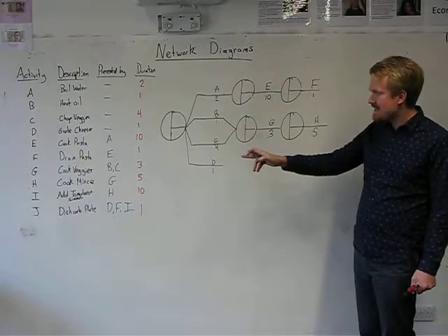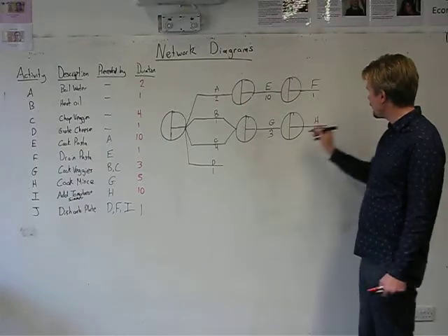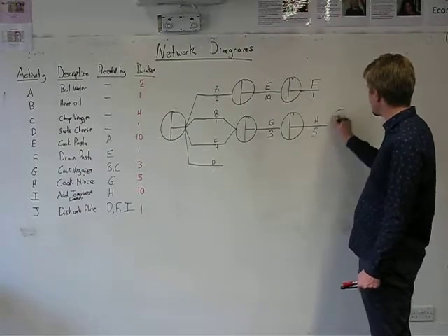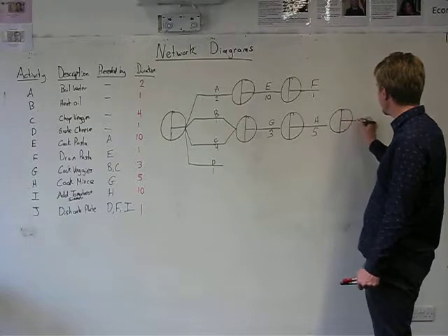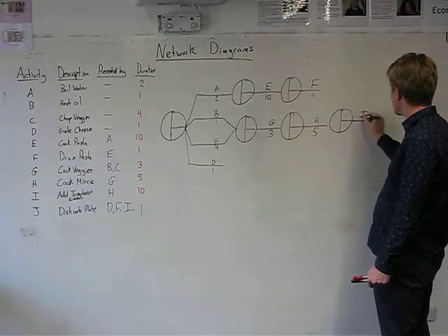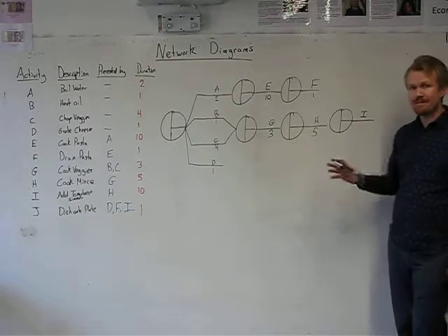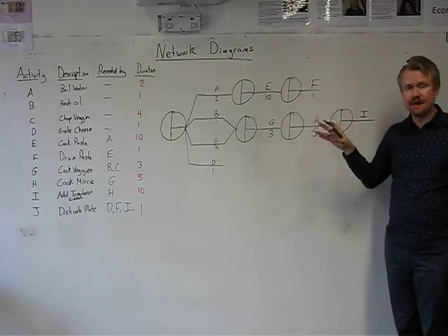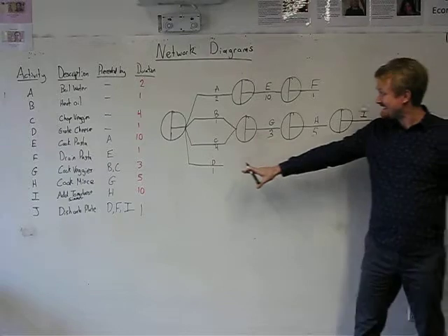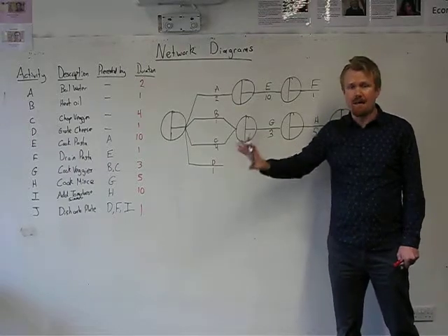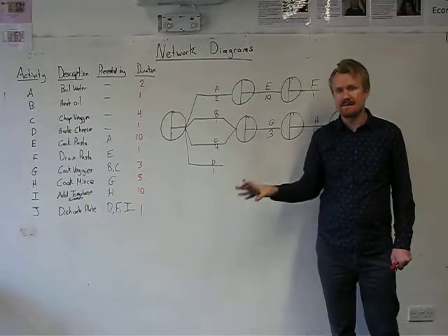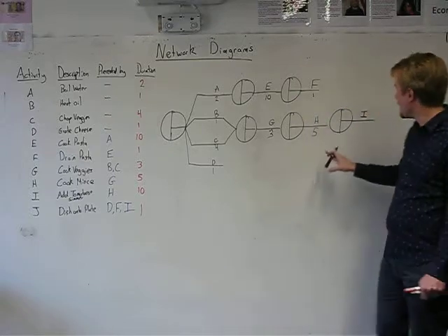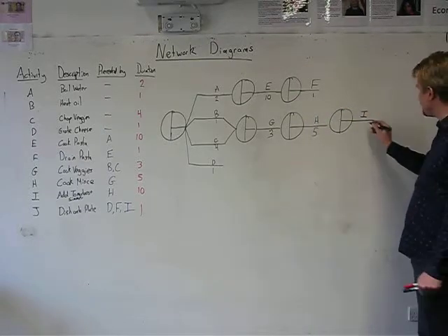Task I is dependent on task H. So I have a new moment in time at which task H is completed. And I'm now working on task I. Notice as well that F has been hanging there without a node connecting on the right side. It's perfectly fine. D has been hanging there the entire time. I'm not worried about those until I find a task which is dependent on them. Right, so task I takes me 10 minutes.